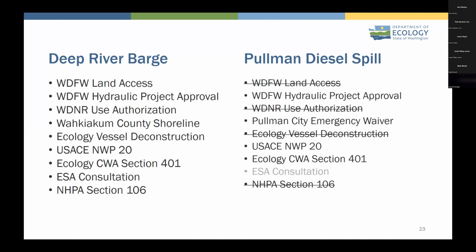Some of them are pretty self-explanatory. For the first one, for Pullman, we did not need to borrow WDFW's boat ramp. We did get 2 HPAs for Pullman. We got an emergency HPA to dig those first couple holes, and I think we got a second, I think it was an emergency one as well, a second HPA to actually do the bigger project. Consulted with DNR on this one, but it was not near state-owned aquatic lands, so they said no permit necessary.